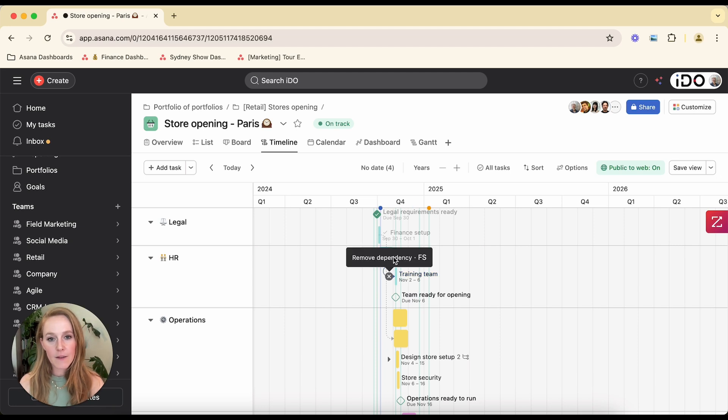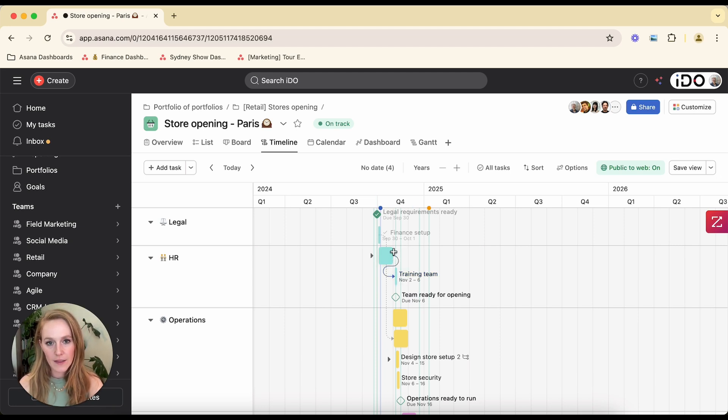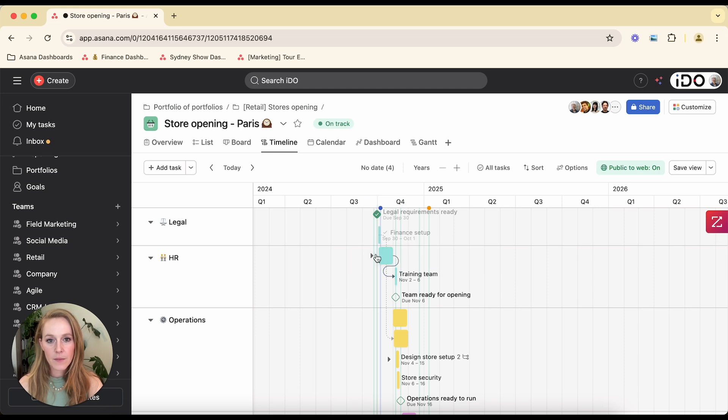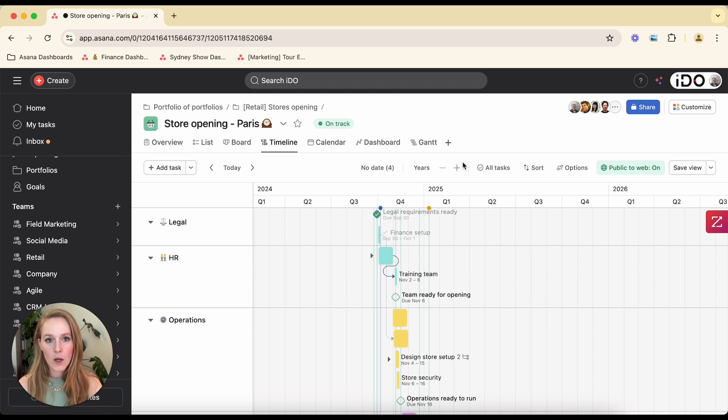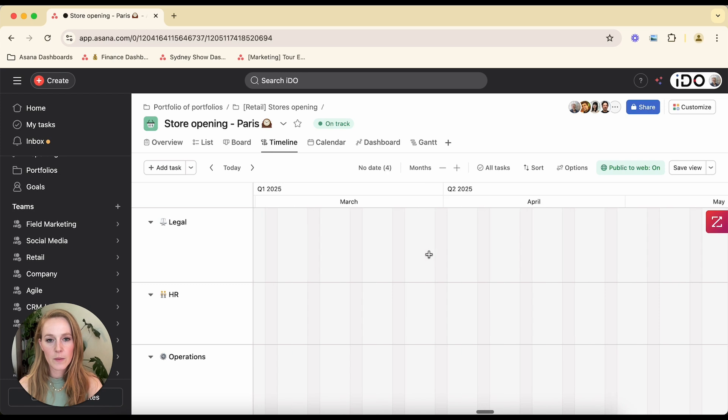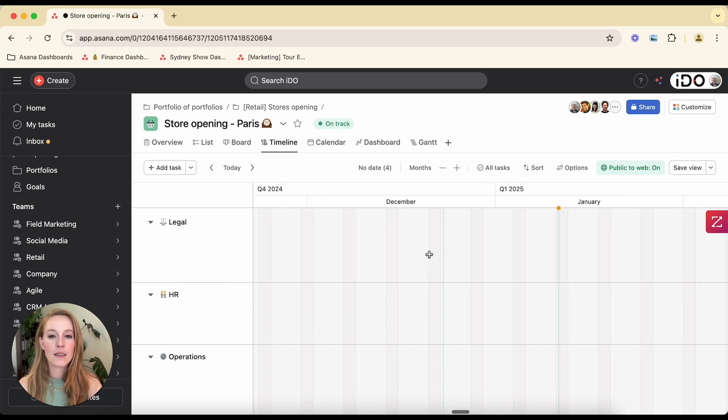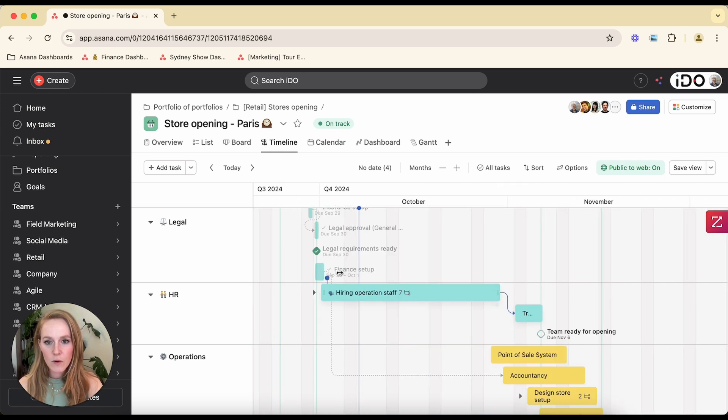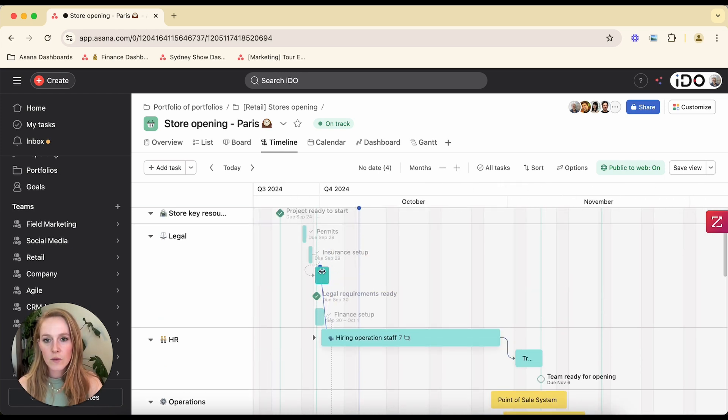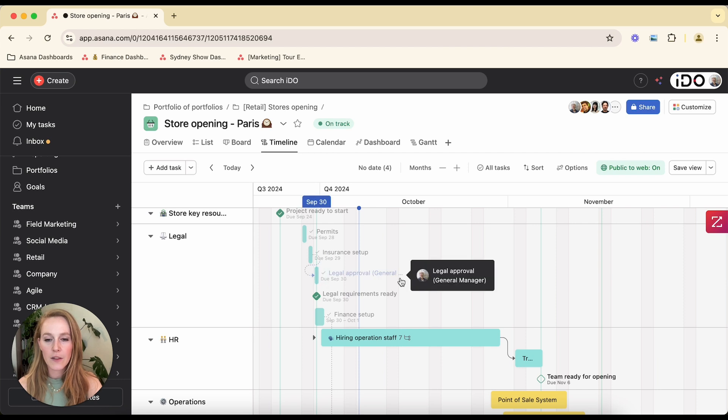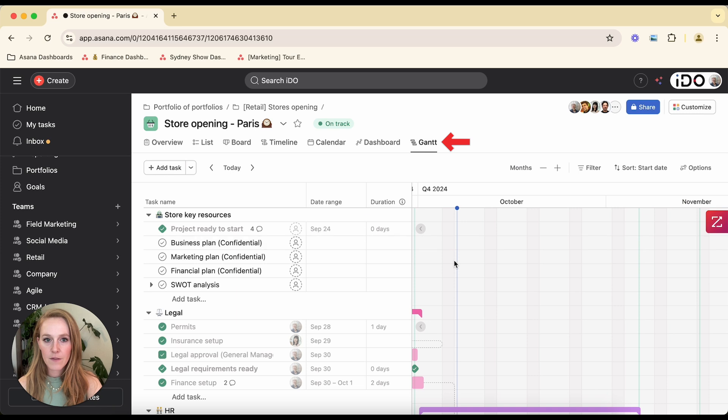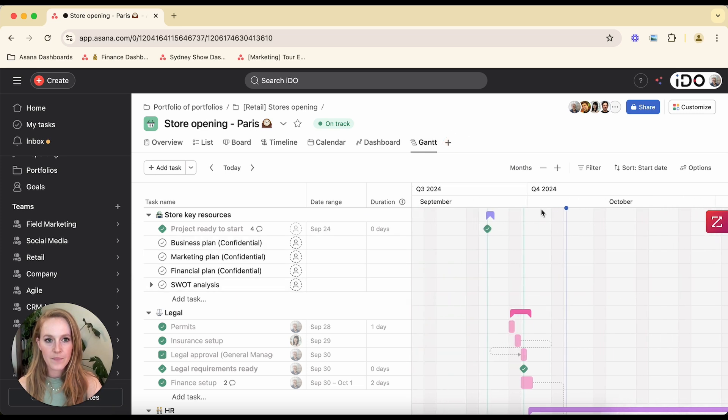So I can see that this is a finish to start dependency because it's starting at the end date and it's blocking the start date, but you can set up these dependencies by simply hovering over these tasks. Let's zoom in here so we can see a little bit better. And if I needed to drag another dependency, I can drag that straight onto another task to mark that as dependent. You're also able to visualize these dependencies on the Gantt view in a similar way.